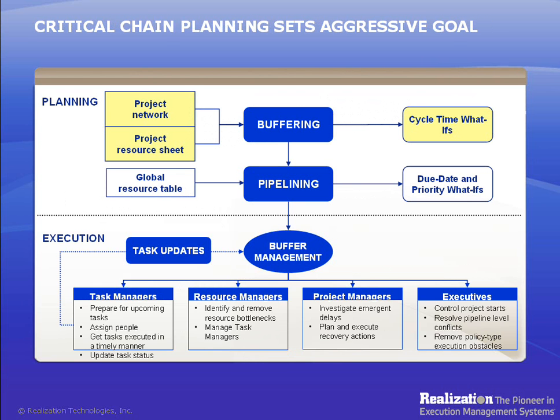When talking about the Concerto system, there are three main components of the Concerto software that correspond to the three parts of the critical chain solution in a multi-project environment. First, Concerto Critical Chain Client enables single project critical chain scheduling — that is, identifying the critical chain in the project network, adding buffers, performing global task duration reduction to extract hidden local safeties, and analyzing the critical chain project network to identify areas that can be improved to achieve a shorter cycle time.